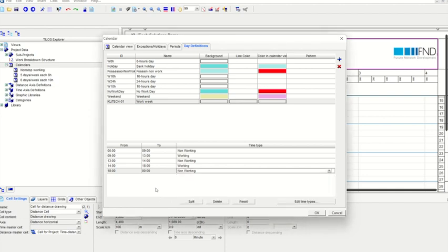It's non-working. So what has happened is, from morning 9 till evening 6 o'clock with 1 hour lunch break, we have defined a calendar for 8 hours in a day for the first work week with 1 hour of lunch. So any activity which we are doing will be calculated based on the number of hours mentioned here on the time. So now, as we told, let us keep alternate Saturdays working.